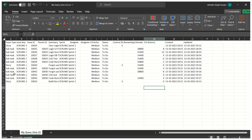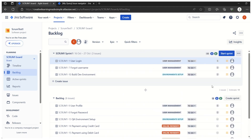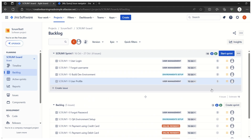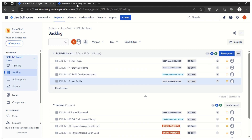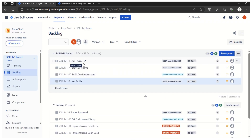Another thing to show: on the board, if we pull another user story from the product backlog into the sprint backlog — a five story-point story — the total goes from 11 to 16. Re-running the query now shows 13 items instead of 12, because we now have four user stories and nine tasks (9+4=13). This confirms the query is working correctly.